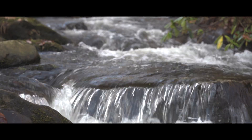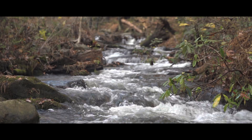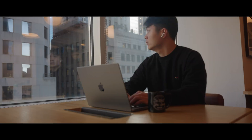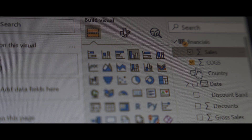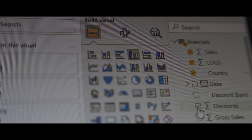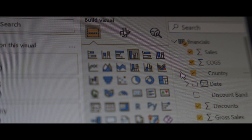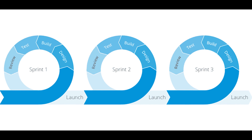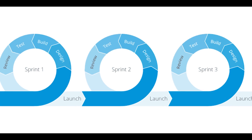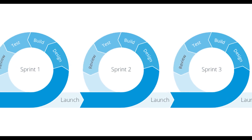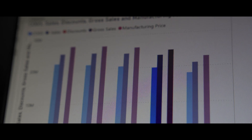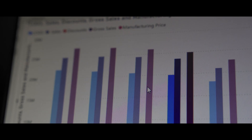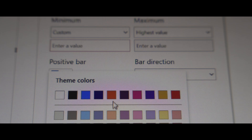The expectations and deliverables of each stage are clear, and as a result it doesn't allow flexibility and changes throughout the course of the project. In contrast, the agile methodology follows a more fluid approach to project management, which welcomes incorporating changes to the goals and objectives stated originally. It also accounts for business stakeholders' feedback throughout the process. To make room for all these changes, a team will work in short-term iterations, also known as sprints, that usually last for only a couple of weeks. In this way, projects can be efficiently completed with any additional requirements listed by the business stakeholders.